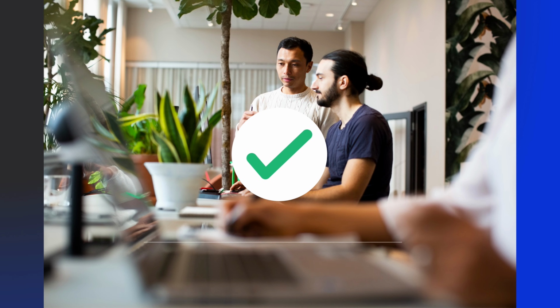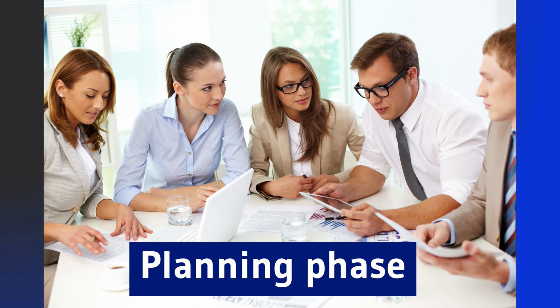Now on the opposite, let's think about the planning phase of the project. Here it can be very difficult to compress the schedule, as a business analyst needs to meet with the customers, gather all their requirements, consider all the scenarios and put that together.